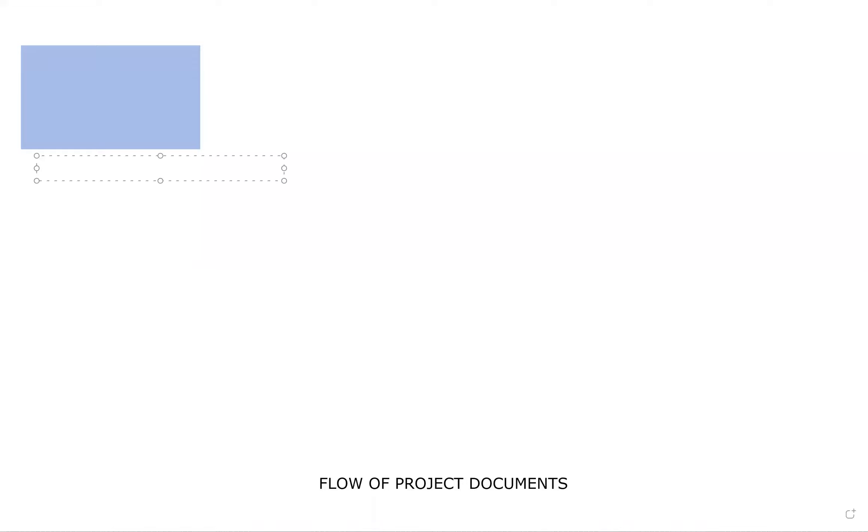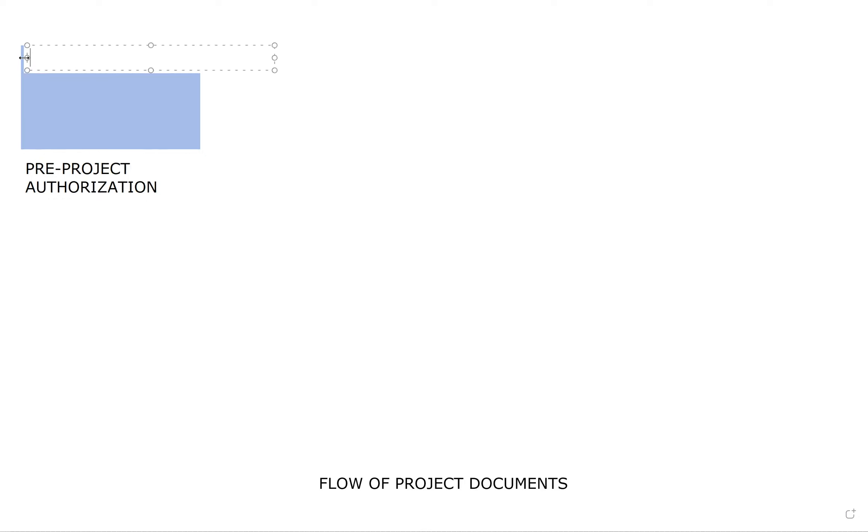We can break down the flow of documents like this. Things that happen pre-project authorization. This starts off with two documents. One is called the business case. The business case makes a case for the project and shows you why the project should be in existence.